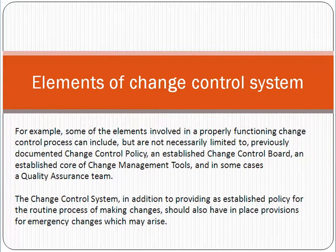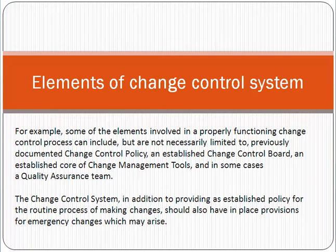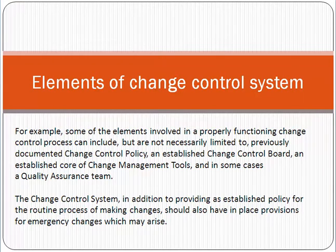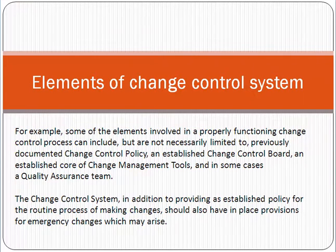All these documents are presented to the Change Control Board as a request for approval to implement the change at production. The CCB — which includes senior management, IT administration, project management, and QA — reviews everything. If they find any gap or problem, such as a QA report or user acceptance report showing the change is not okay, the CCB has full authority to reject or postpone the change. If everything is okay, they give go-ahead for production implementation.